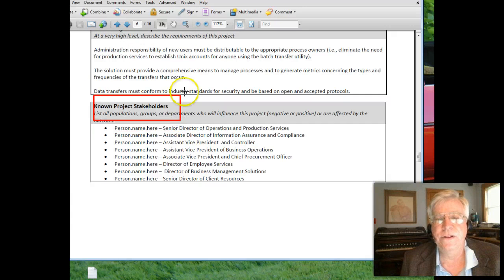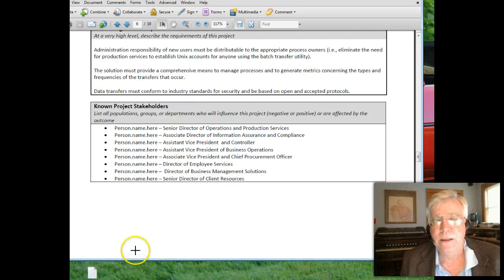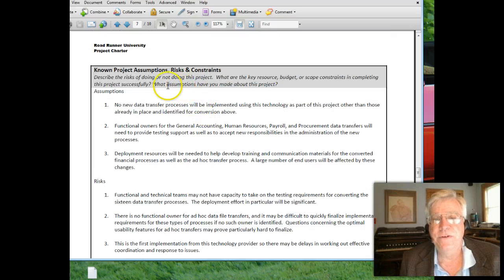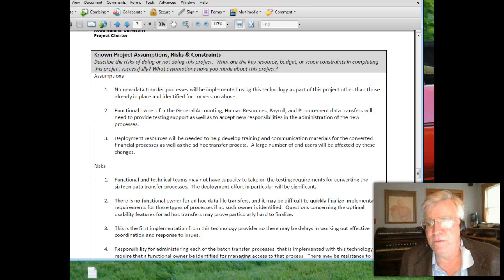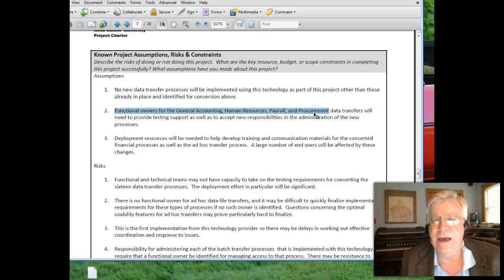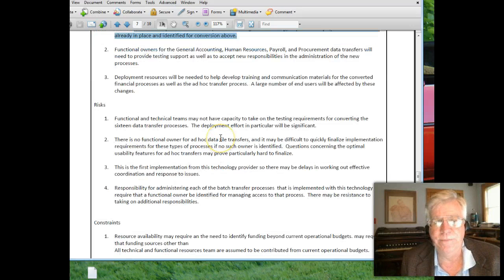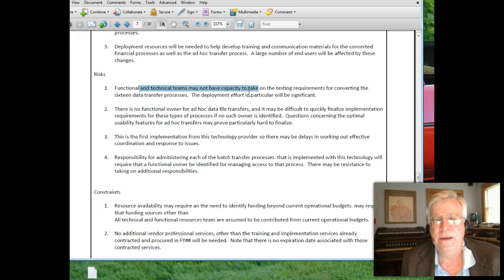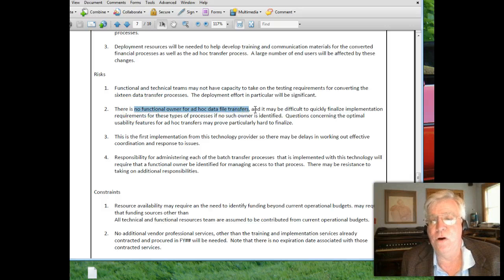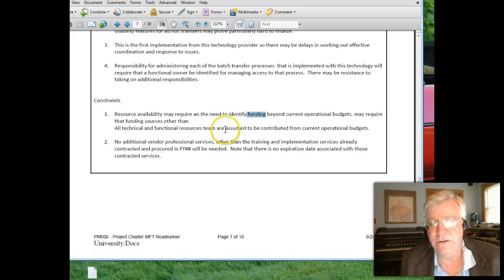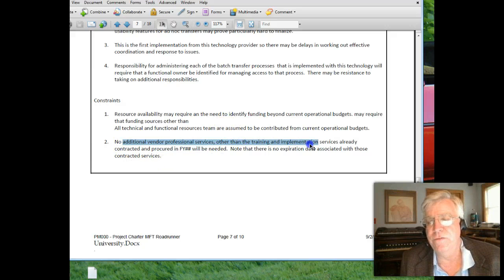Key stakeholders: here's the list of people and players who were the drivers of this project. For risks, assumptions, and constraints: getting other people involved for testing and programming would take effort, functional owners in various departments needed to help, resources were required for training and communication. Risks included other technical teams not having capacity, and having no clear owner for the old systems. The biggest constraints were always funding, time, and resources — we had no budget for additional training.